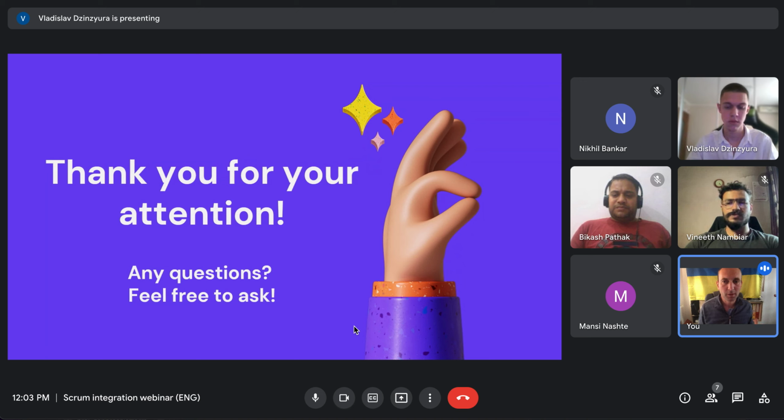For example, we have a Monday call and we have a Monday release every week, and then we have a build demonstrated to the client and we have feedback taken from them. This helps to discipline everybody and to take that feedback from the product owner, from the business, and also to have the technical team prepare everything for that in time.